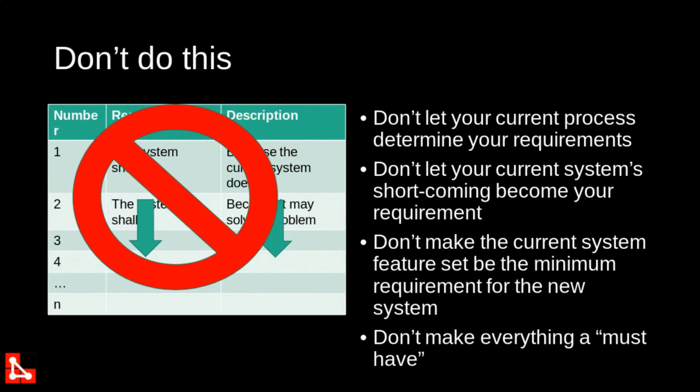So if you start at 10 a.m. and you finish at 10:30, that would just be 30 minutes. In their case, it would be 5 units. Those requirements actually cause extra work. It's based on the current system's shortcoming or limitation. So be careful with it. Don't write it from your perspective of what your current system does. Don't let your system's current limitation become the requirement of the new one.